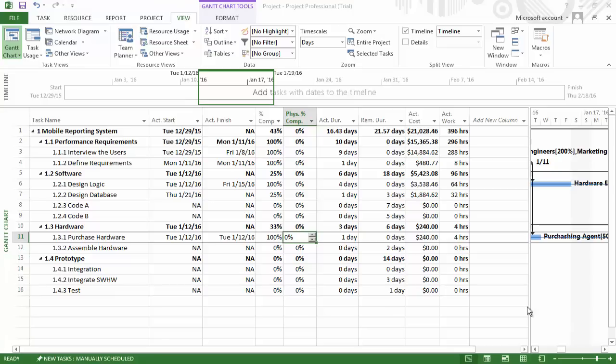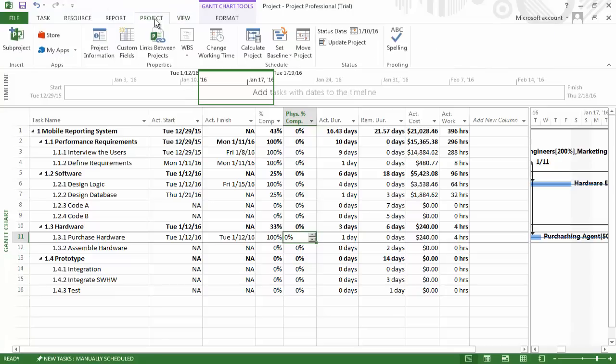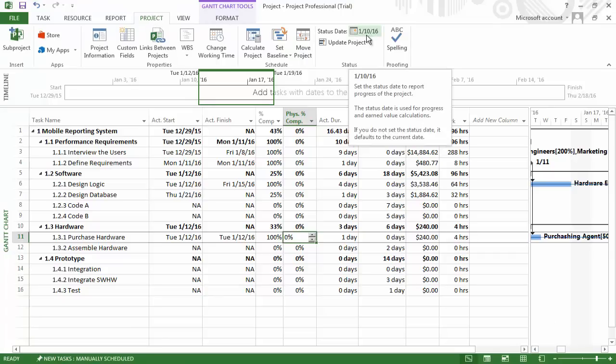If we click on the project tab, we can confirm that our status report date is indeed the 10th of January. I have found that even though you have entered in the status date and saved it, after closing the software and reopening it, the status report date will occasionally need to be re-entered.